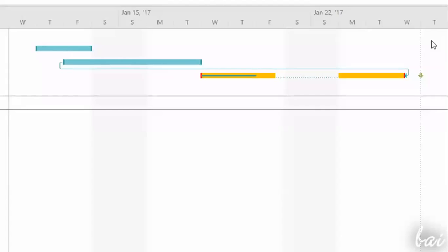So whenever you get a template, and if you have your WBS, you just copy paste it here and try to give a predecessor and then attach a schedule to it. The template already has the holidays and everything marked as a schedule, because holidays normally come from the HR, right?